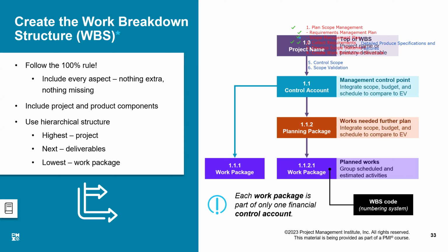The project manager is only going to ask you, give me the progress for that wall. How much has that been done? You will say, okay, this is 50% complete or 20% complete or something. But again, I would rather use that 100% rule. But if he wants to be specific, then I can say, okay, this much material which was planned on the construction of the wall, out of that, 25% of material has actually been spent on ground. This is quite a statement. This is quite a progress, right?